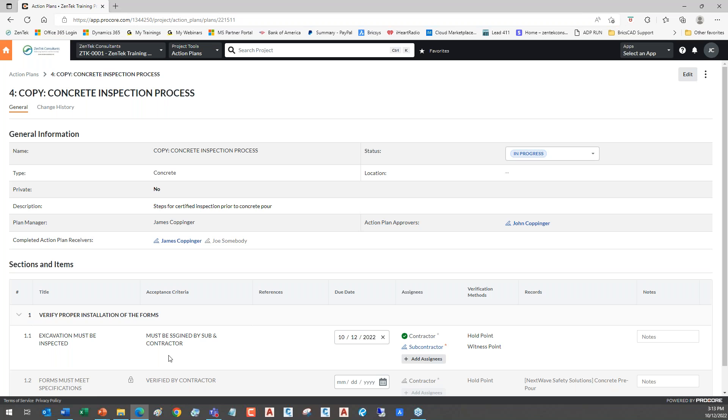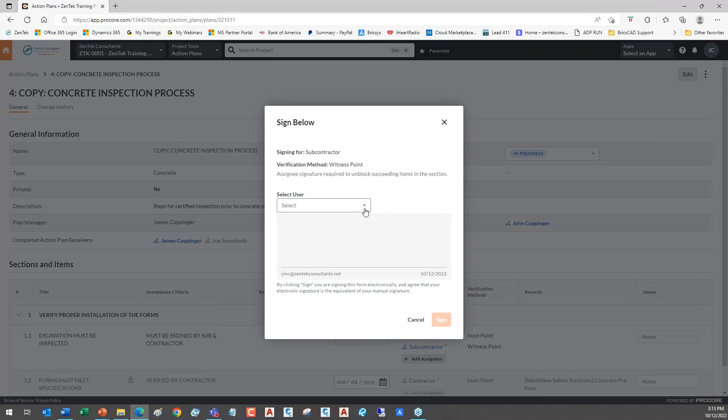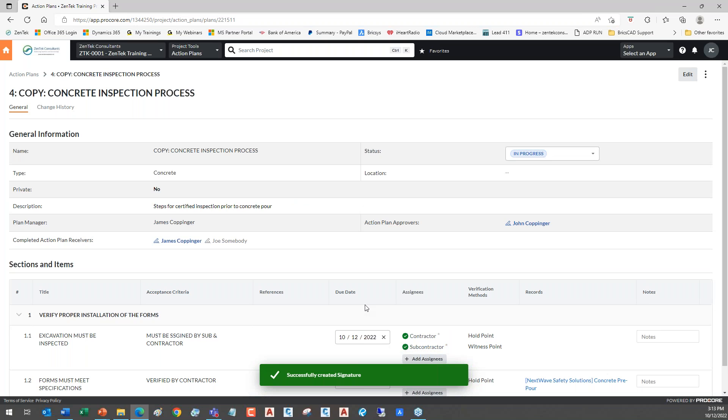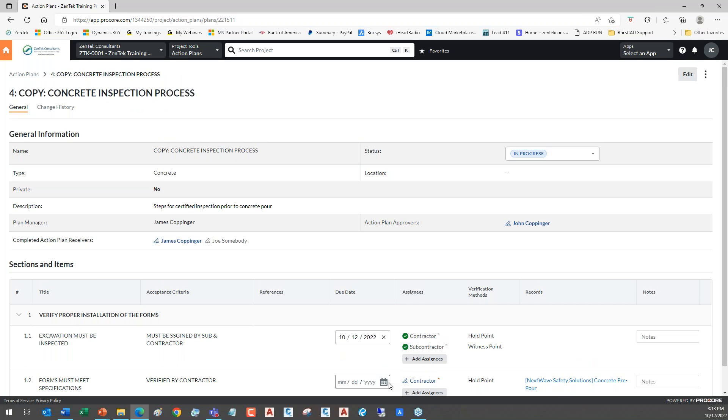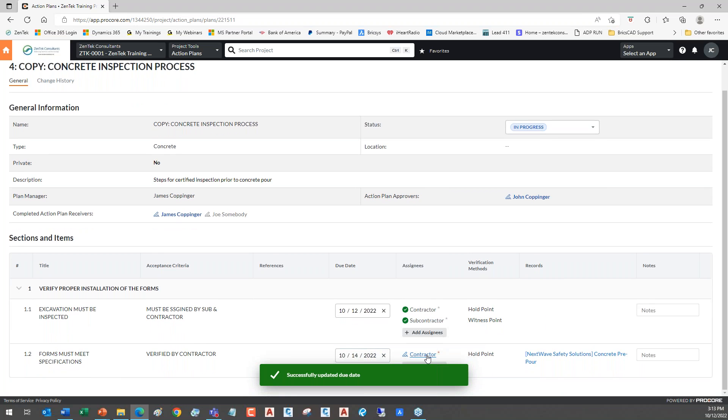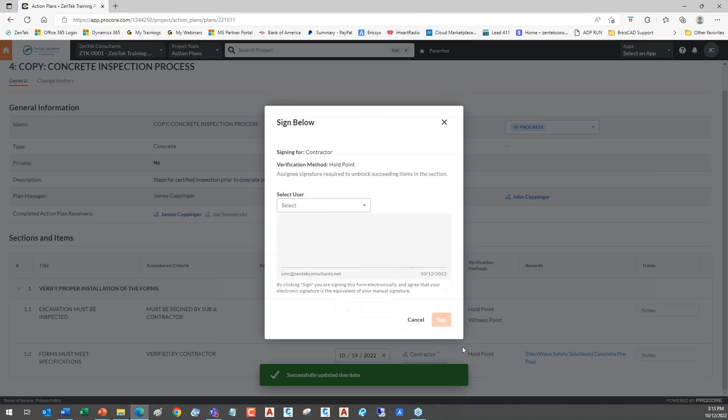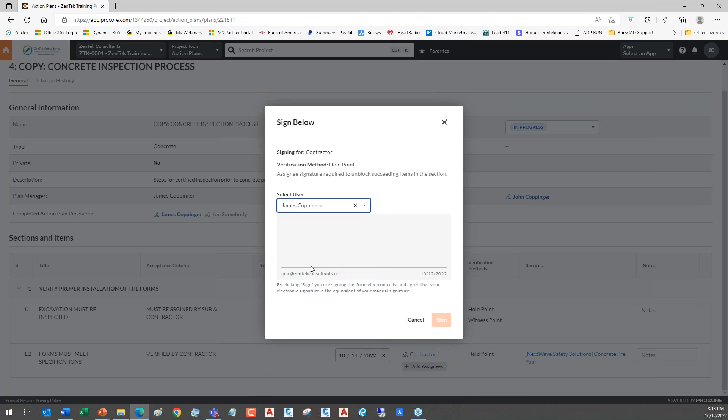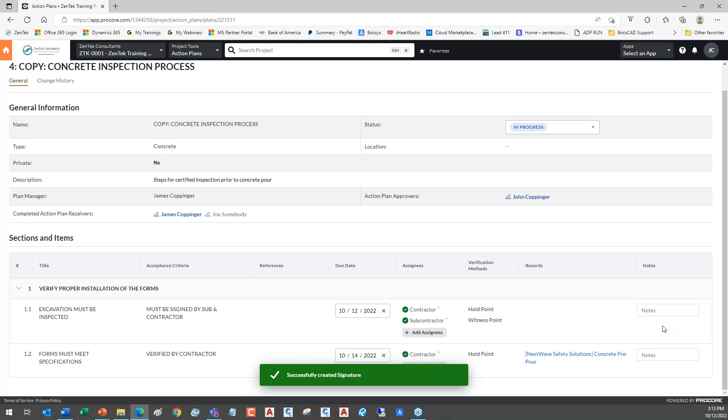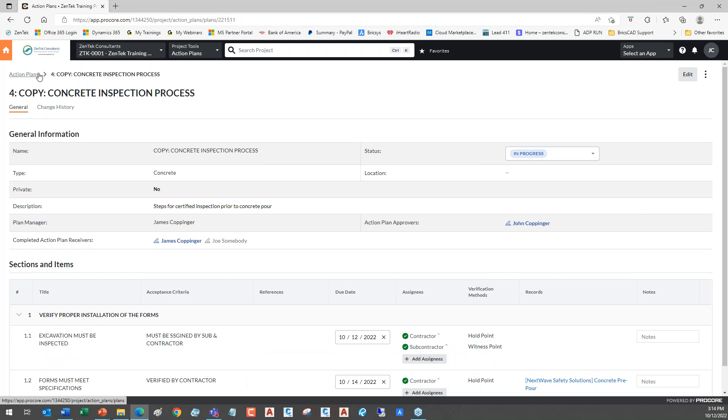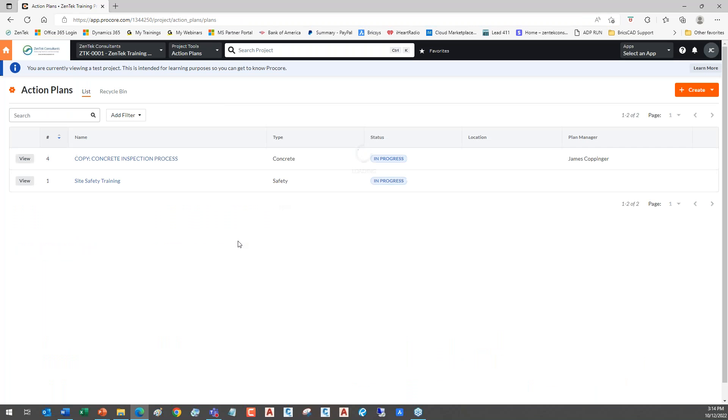So he can just go in and say this is Joe S signed. We now have an actual signature saying that Joe did this. He's verified that that's been done. And now it can't move forward. It can't be marked as completed and you can't go to the next step yet because the subcontractor needs to sign. So I can go in and I can put in my initials there and sign that. There we go. Now it's done. Now I can move on to the next structure here. That gets done on the 14th. And now once that set date, I can go ahead and as the contractor sign off on it. And now I have a completed plan.